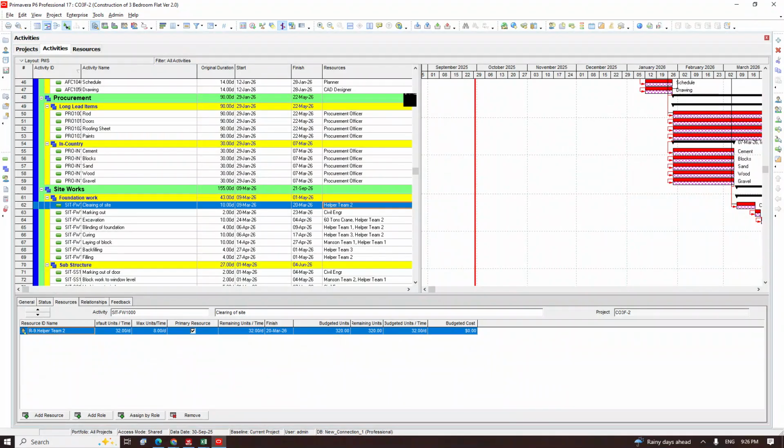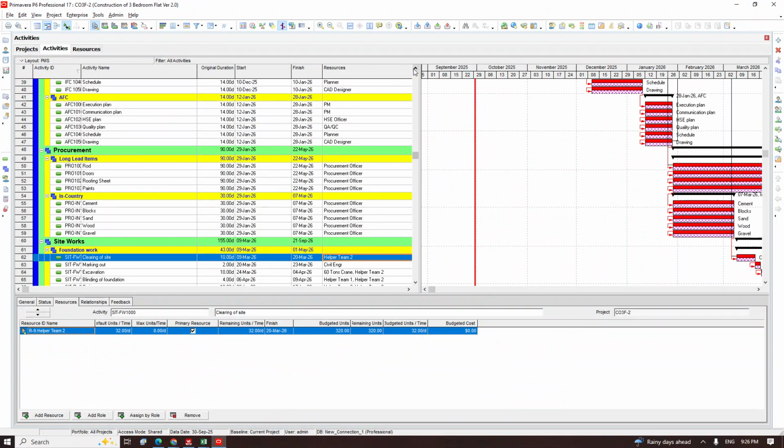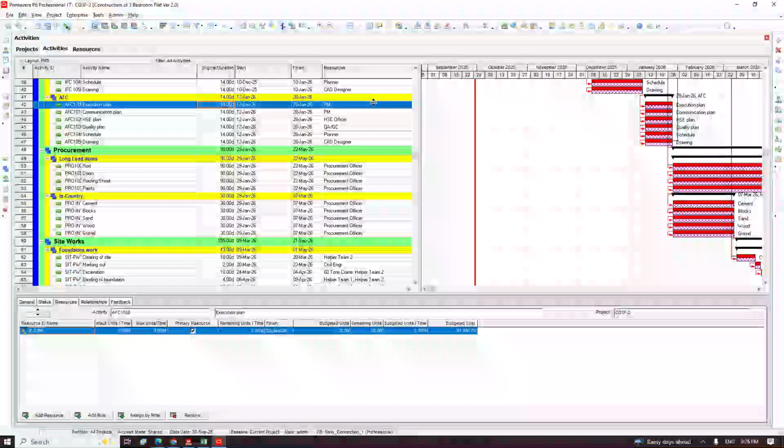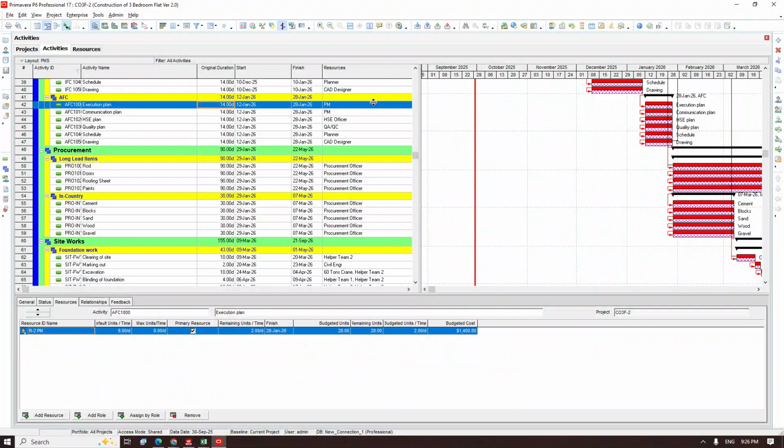Now, we have a document for him to do. Since we know that he spends more time doing other things, he won't spend more than 2 hours a day working on this document. He has 14 days to do it. He might even finish this document within 4 hours. Over these 14 days, he's working for only 4 hours on this document. I don't know if that's making sense. That's why we are reducing their man hours. They are not going to be putting in the maximum time. They are actually using minimum time to do this job. I don't know if that is clear. If it is clear, let's look at the next one.